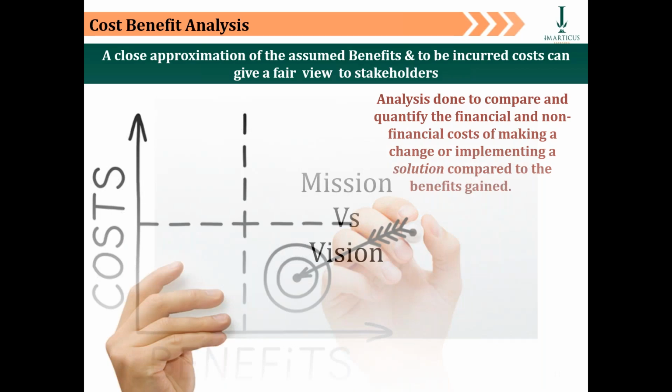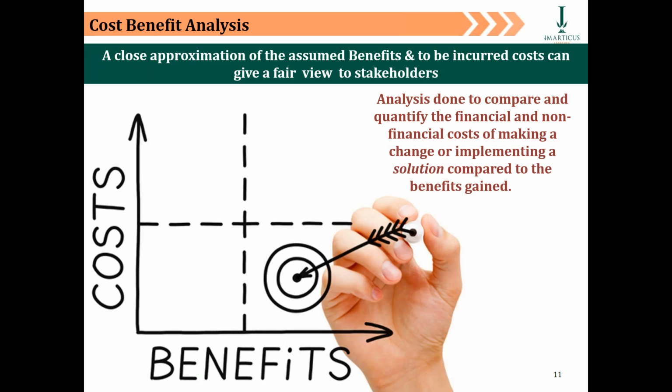Sorry. Okay, so guys, remember, I want to spend a few minutes on this. When you say you're building a cost benefit analysis, at least the cost part is clear: how much labor cost, how much manpower cost, how much effort, how much equipment cost, how much new technology and software purchase cost. All the cost components are quite clear. It is the benefit part which is a little unclear, so you have to take some approximations there.